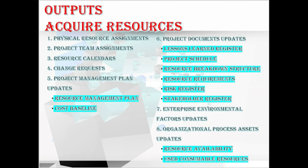The next output is change requests. When changes occur as a result of carrying out this process, the project manager needs to raise a change request, and it must go through the PICC — that is, Perform Integrated Change Control process. The project management plan updates include the resource management plan — updated to reflect actual experience in acquiring resources and lessons learned — and the cost baseline, which may change as a result of resource acquisition.